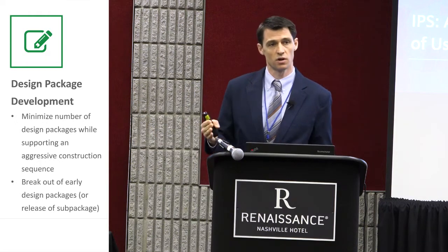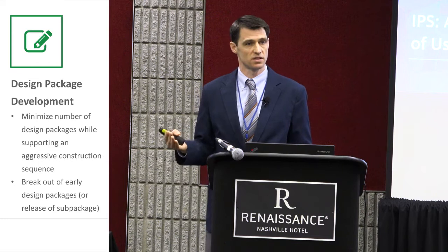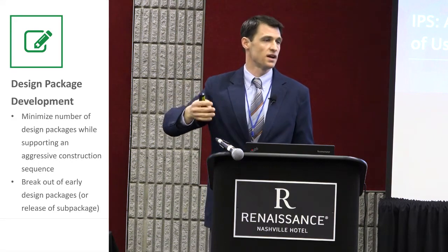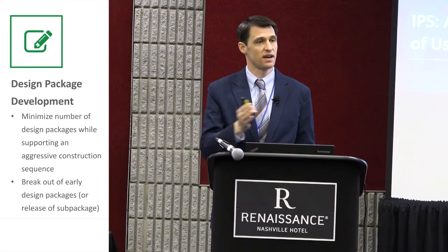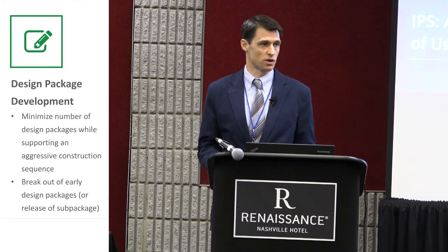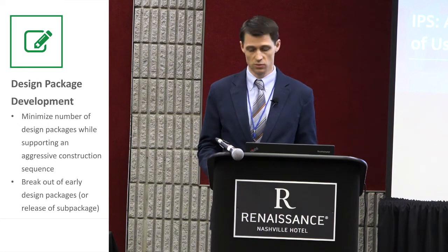We didn't know what those were because we didn't have a defined schedule. So what we're doing is working through, going from level 1 down to level 2 to level 3, and then using Netpoint to finalize that decision about our required on-job dates and when we need to do procurement. Therefore, we need our design packages when.